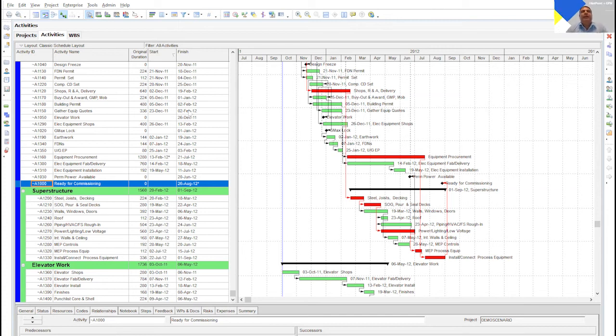So that is what we say for NetPoint, that NetPoint gives you that flexibility to put activities at a different date other than the early start date. Unfortunately, with CPM calculations, everything gets pushed to their early dates. So let's say you were doing a simple resource balancing in your project, and you do end up having a particular resource above the limit, right? So at that point, you decide, okay, maybe I am running 3 different fronts on my site.